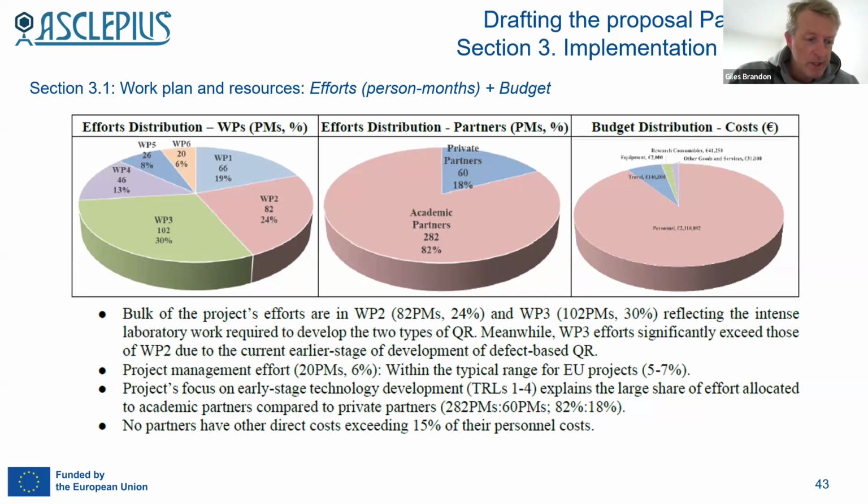Try to keep below 10%. There will be cases for certain projects, perhaps coordination support actions, where it needs to exceed 10%. If it does, make sure you write some words to justify why you've gone above 10%. It'll help to defend yourself.